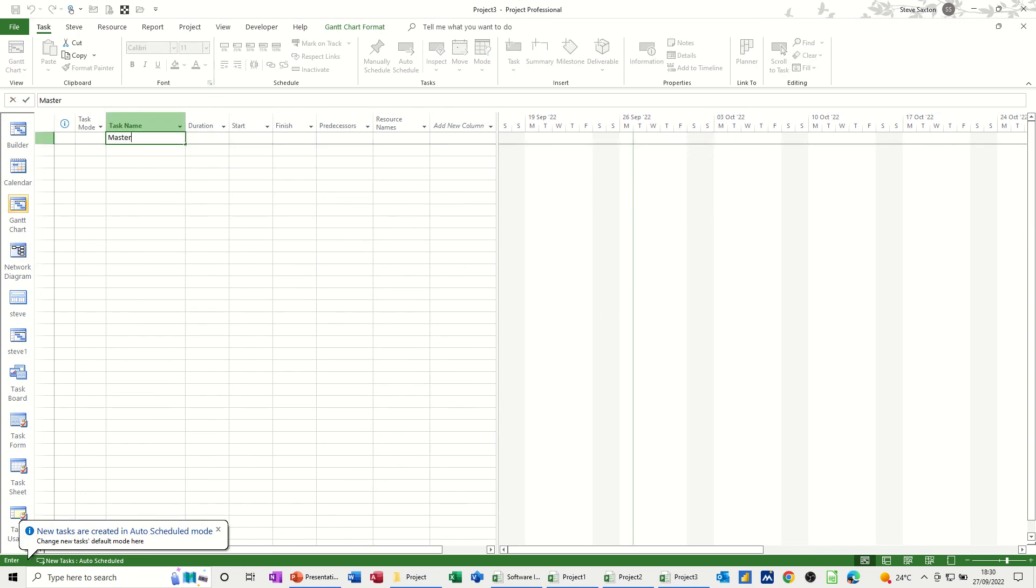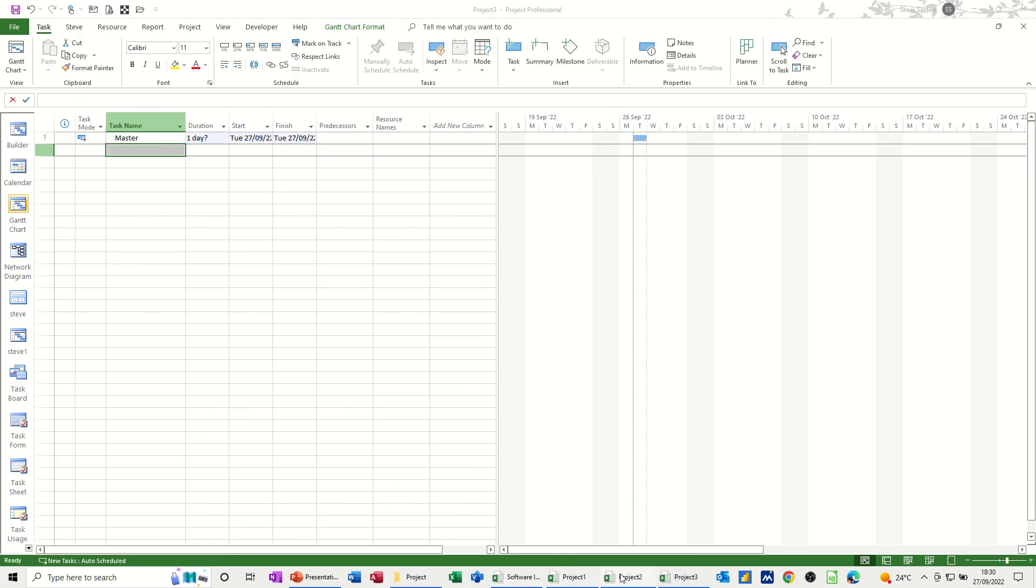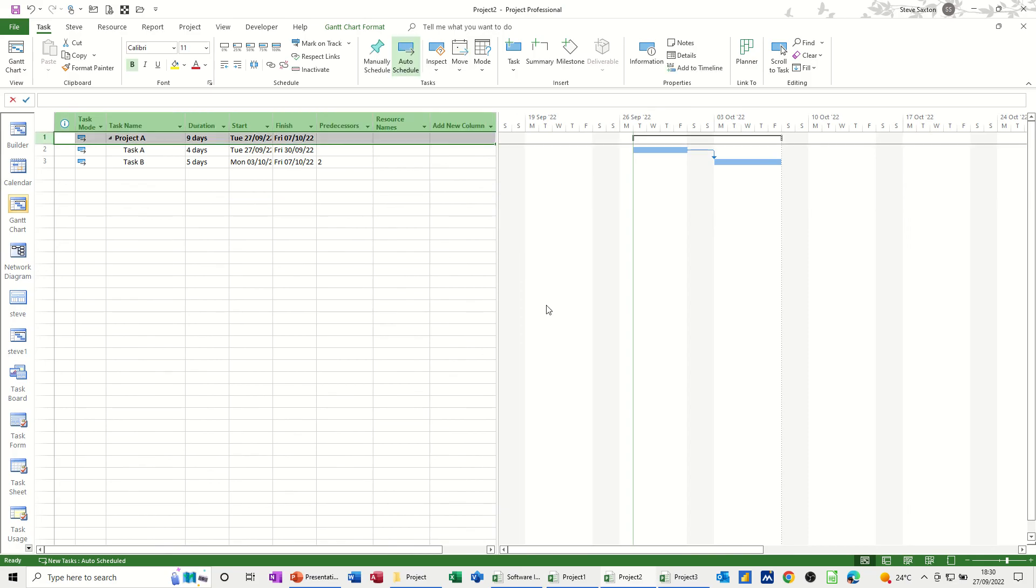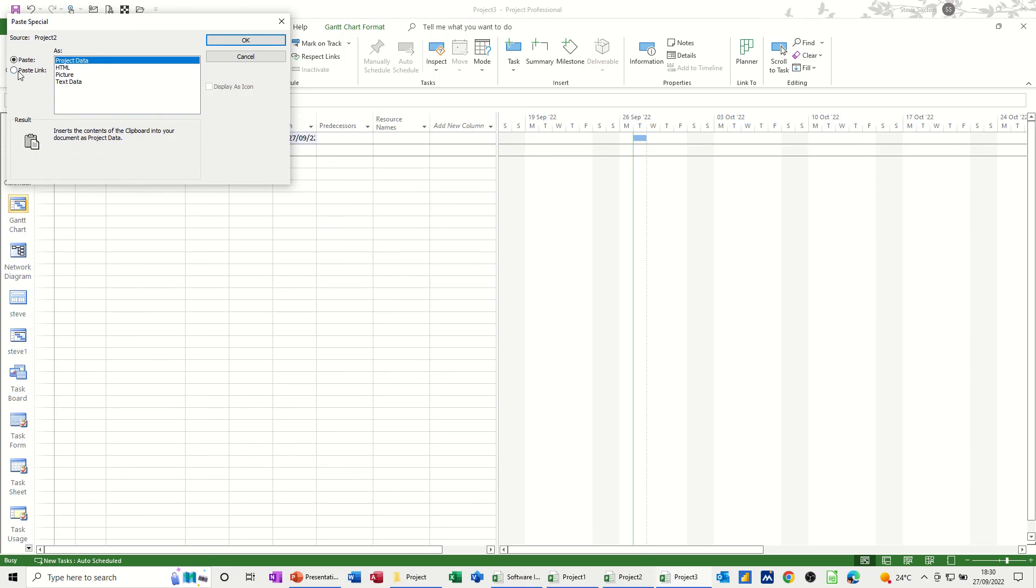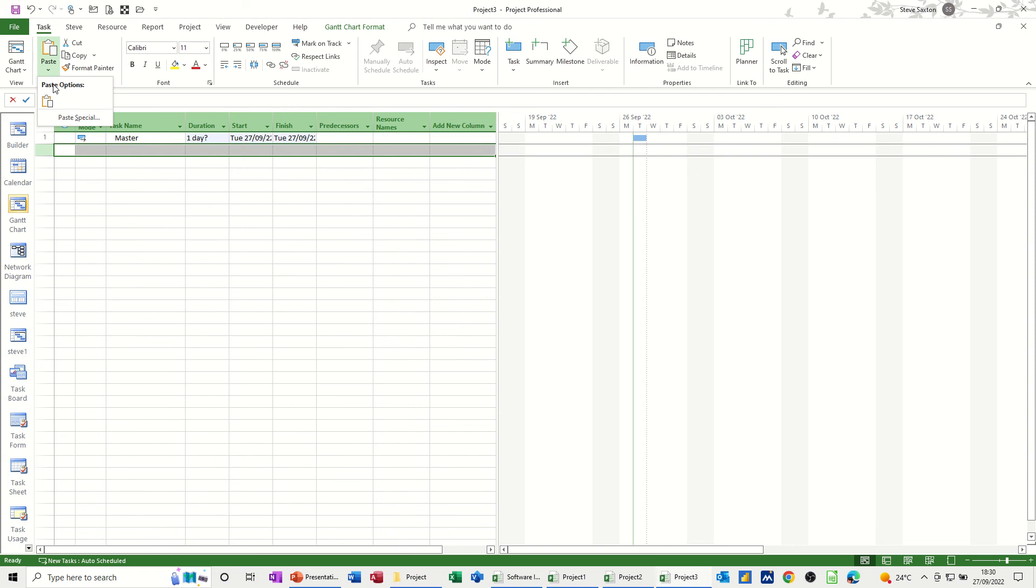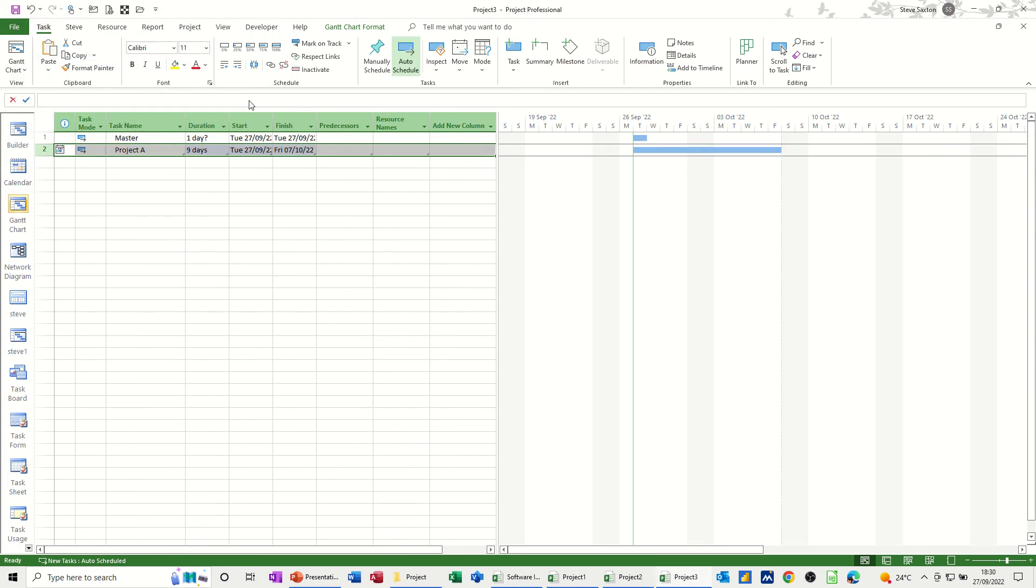It's a different way of doing it so you're basically bringing in the summary tasks for each one of these. So if I go back to that one you highlight row one, do ctrl C to copy, and then come back into this file and then go paste special, paste link, OK. Before I do that highlight the thing, would help. Paste special, paste link, OK, brings it in. Indent it across, nine days total, project A nine days. Go back to the project.